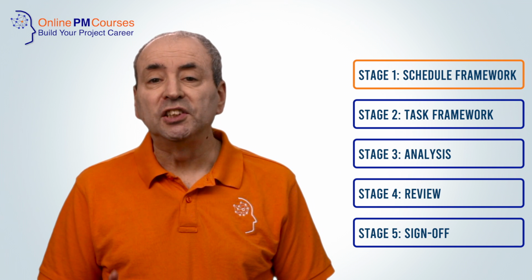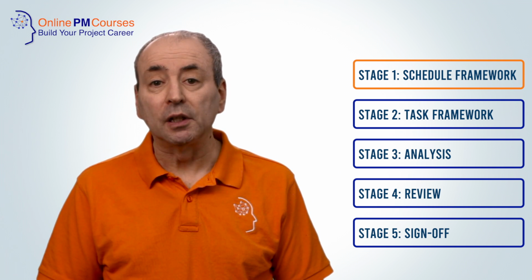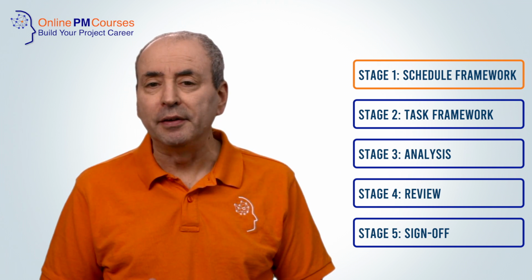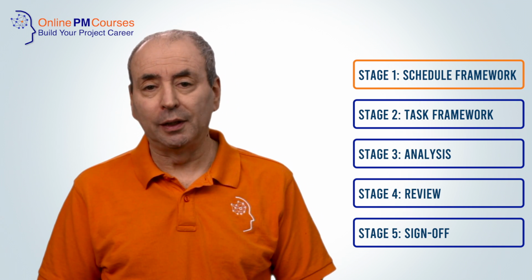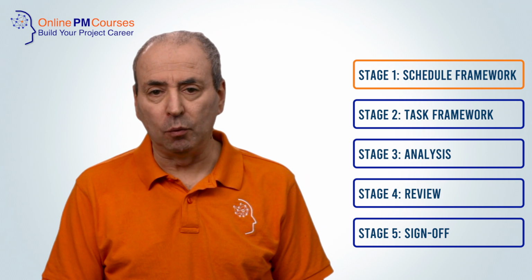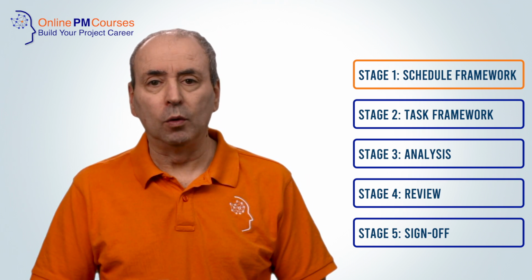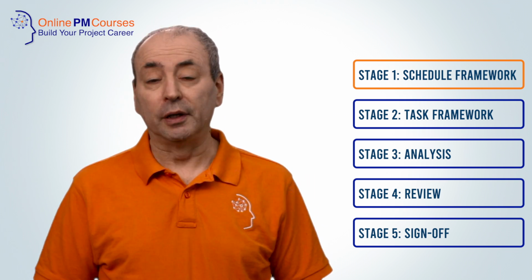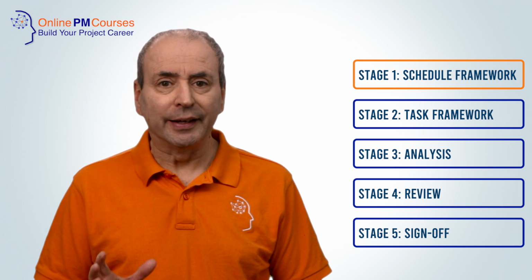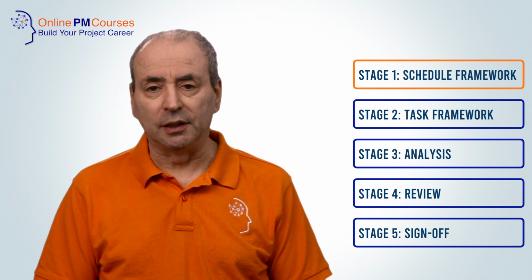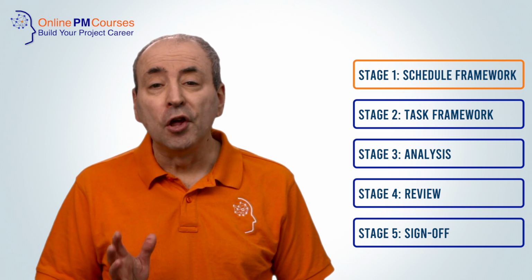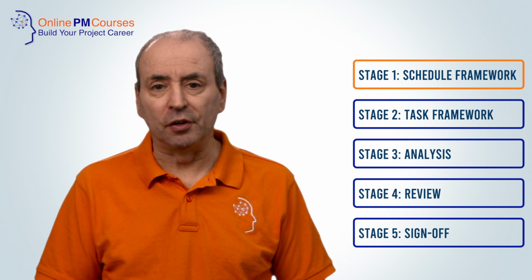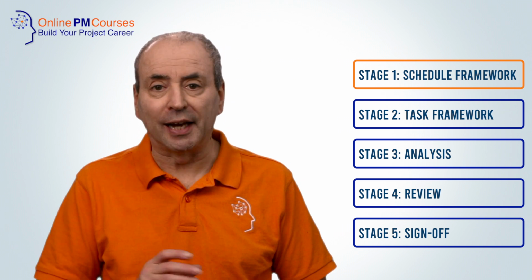Step 5. Consider the number of working hours for each day, and this may be different for different days. Some organisations have shorter working days for the last working day of the week. And remember, if you've got non-working days in the week, as hopefully we all have, then you need to allocate 0 hours to those days. Critically, don't forget that the non-working days may be different in different regions and locations.